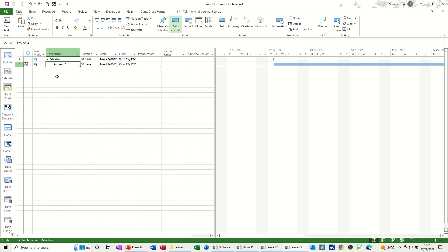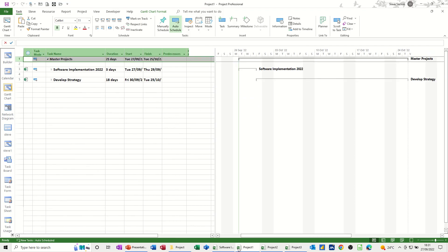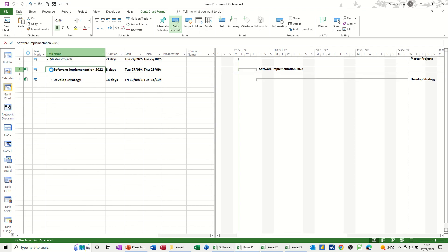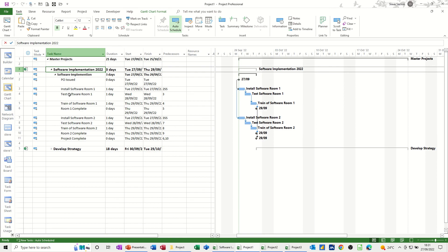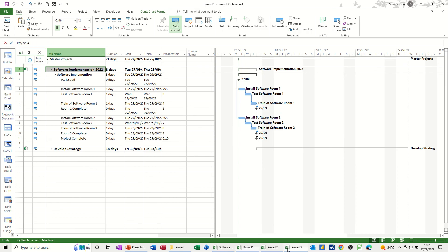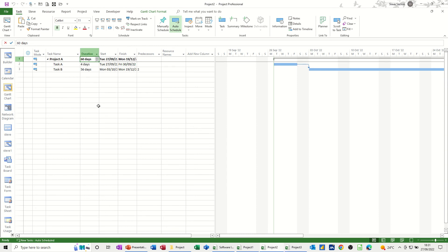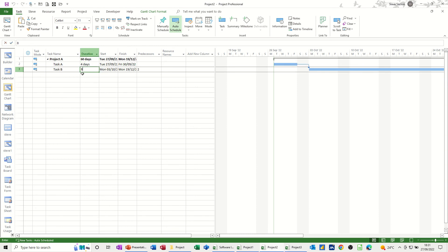So there's two ways that you can create a master project file. One with sub-projects where you're bringing the whole project in, that was the first one that I did, this one where they're all in there and you can edit the information, and whatever you do to this will affect the source file. And then the other one, the last one I did, was you're just doing paste special, paste link.